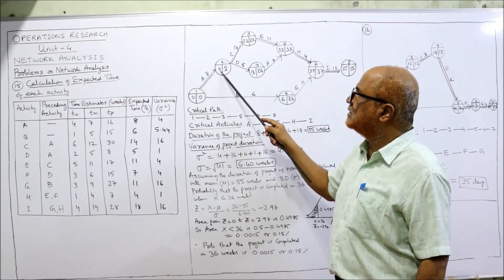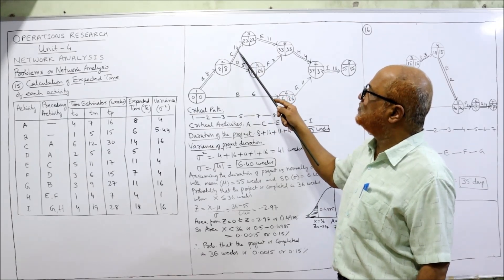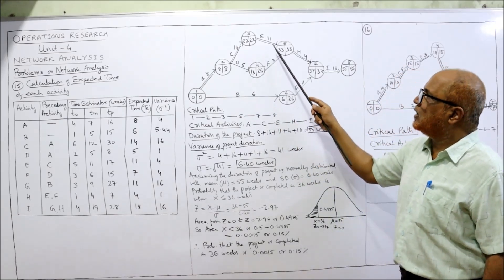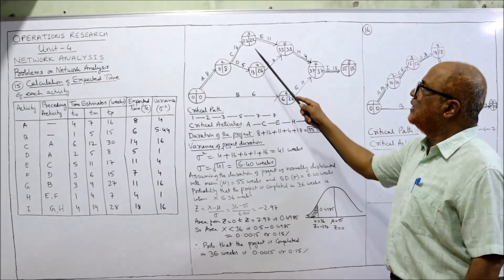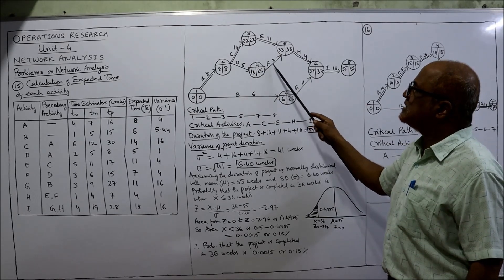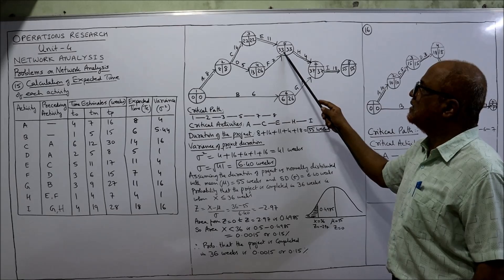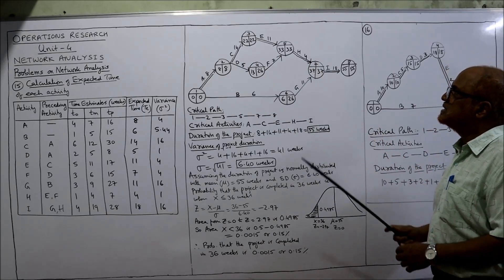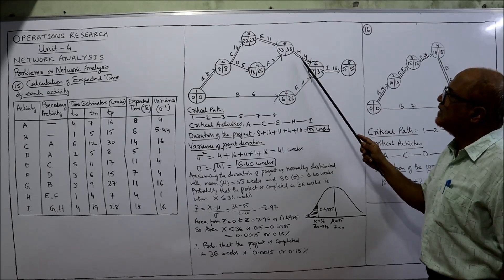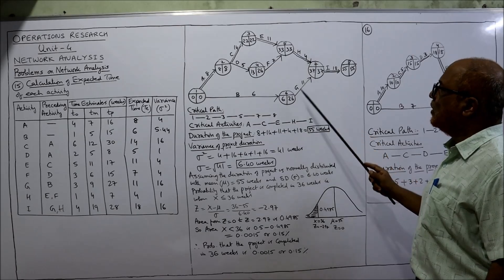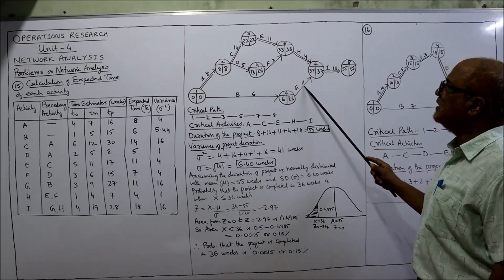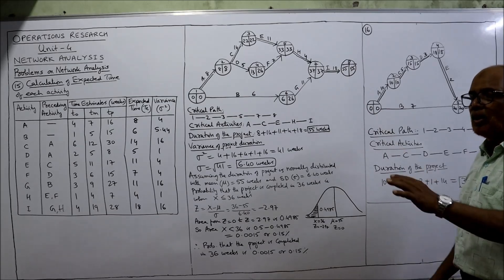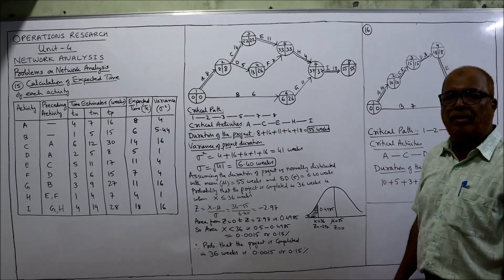Now we start the forward pass to calculate EST (Earliest Start Time). At event 1: start at 0. Only one arrow merging: 0 + 8 = 8. Next event: 8 + 14 = 22. Then: 8 + 5 = 13. Two arrows merging: take the maximum of (22 + 11 = 33) and (13 + 7 = 20) — 33 is higher. At event 6: 0 + 6 = 6. Two arrows merging: maximum of (33 + 4 = 37) and (6 + 11 = 17) — 37 is higher. Final event: 37 + 18 = 55. All EST values are now calculated.